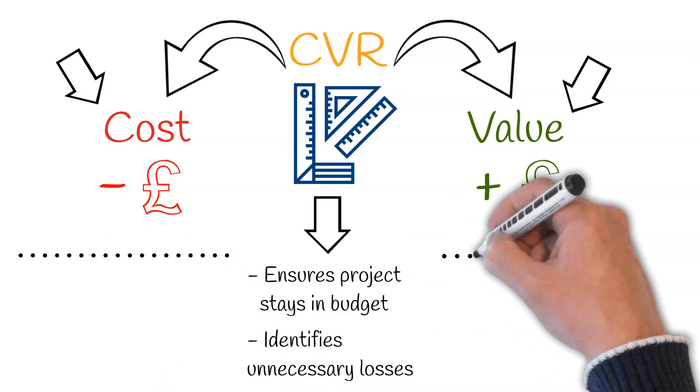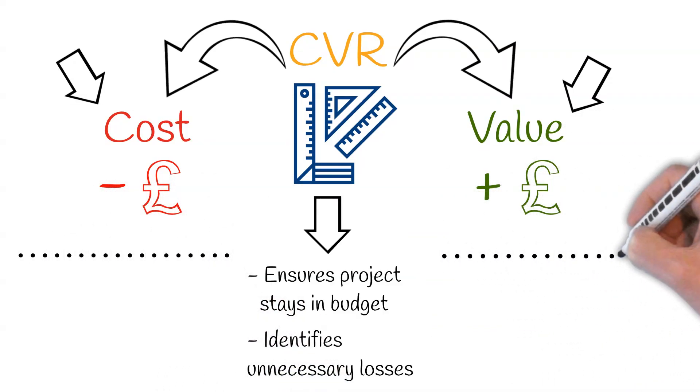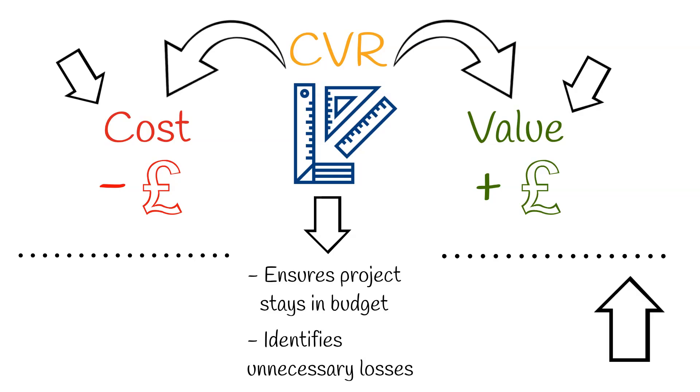The CVR acts as a balance sheet. If the value is higher than the cost, then the project is in profit. If the cost is higher than the value, then the project is at a loss.